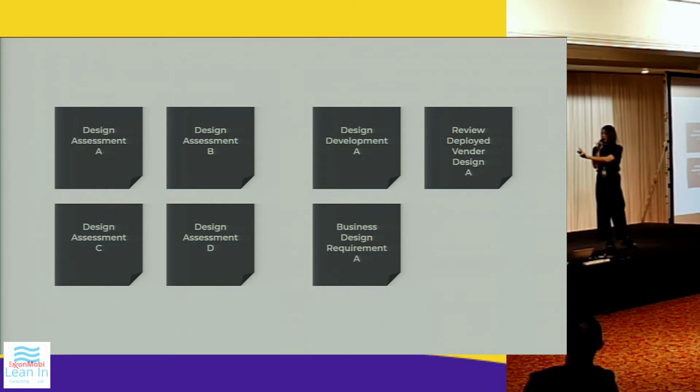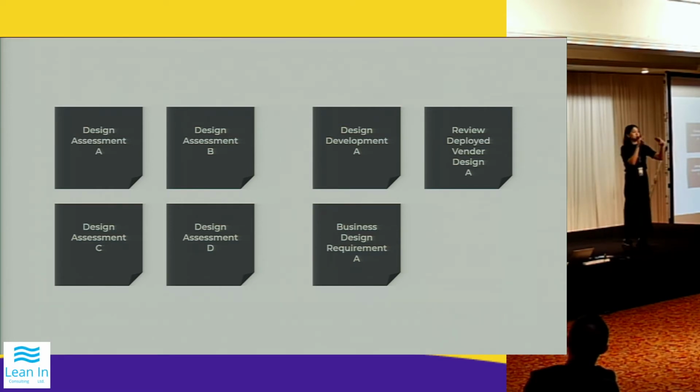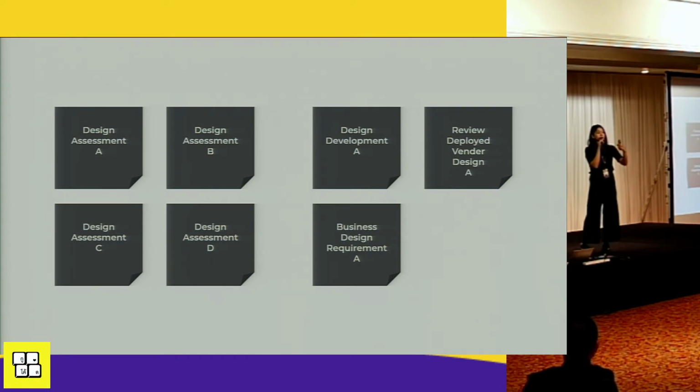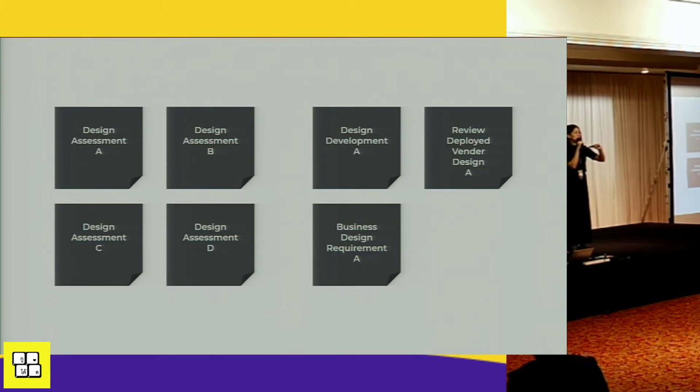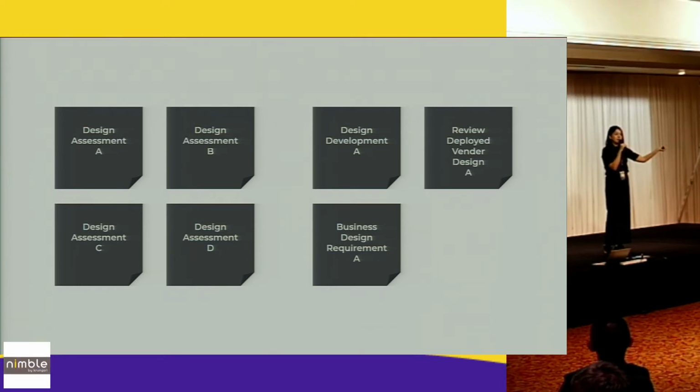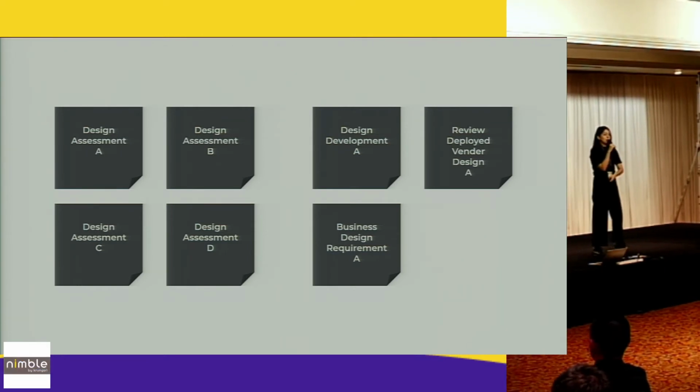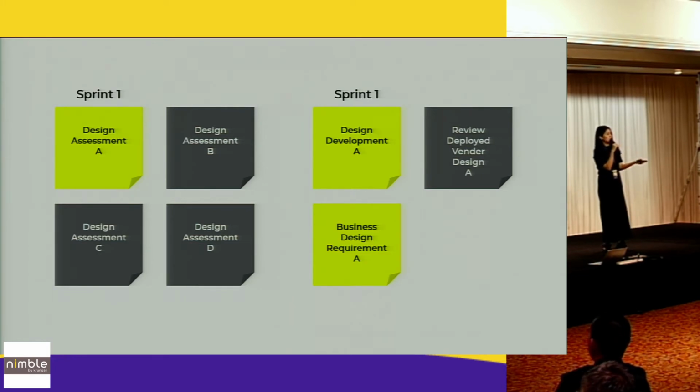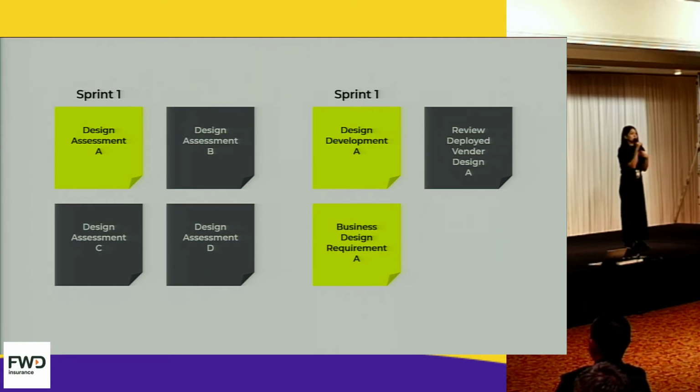And for each use case, I even break it into smaller cards if they have any complexities. For the design development, let's say that I have delivered the new feature design. And if I have to adjust a bit because of the vendor capacities, before I would move the card, but now I will just close this card because I consider that I already took the effort to deliver that, and create a new one. With that, I am able to deliver my work in reality and also in the system, and it also helps me focus on smaller tasks.